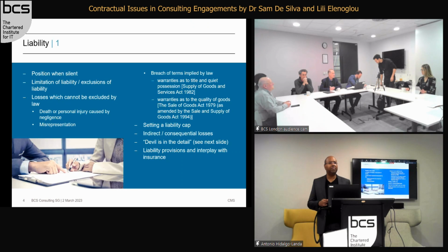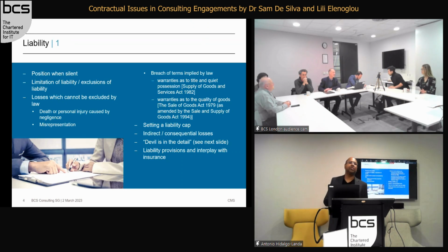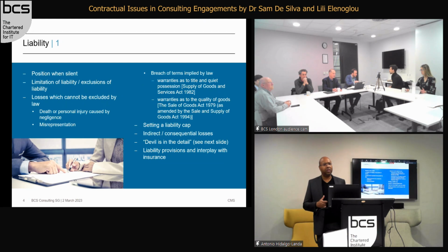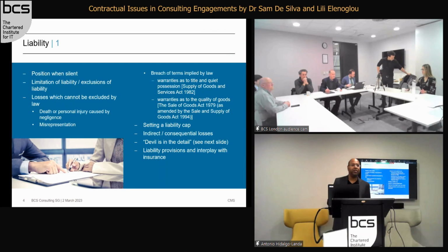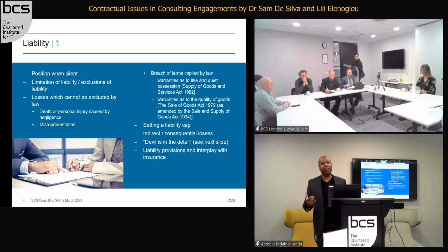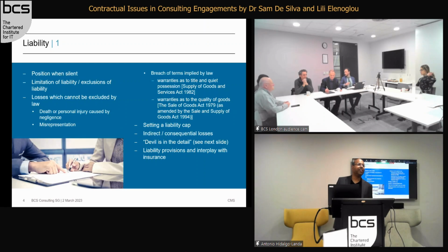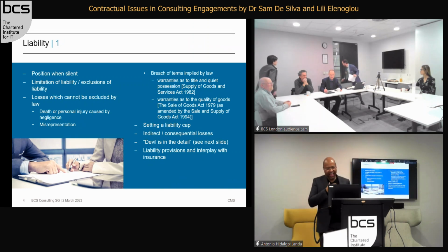David: I thought there's some case law about that, and whether you have to limit the liability to 125% of the fee. No, it's freedom of contract. You can choose 100% and the court is fine. You could choose, presumably, 50%. Okay. Yeah. Obviously, if you choose something really unreasonable like 0, then the Unfair Contract Terms Act comes into play, as it's unfair and unreasonable. But the other party probably wouldn't sign it. Well, they may if they didn't read it.